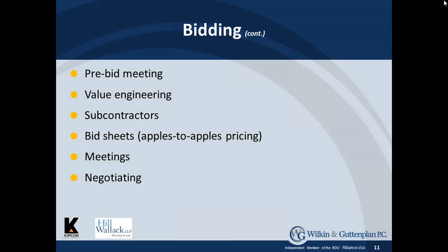Also, the specifications should include bid sheets so that when the pricing comes back, you can compare the pricing on an apples-to-apples basis. Again, I'll mention meeting with the contractor to understand what they're like and how they will operate a job, and then possibly negotiating the job.